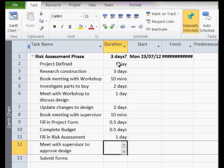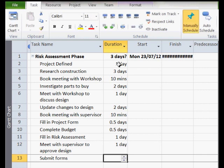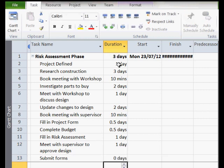Submitting the form is the milestone. It is what we are aiming to complete the risk assessment task phase. Milestones are created by setting the duration to zero days. You will notice it becomes a little diamond in the Gantt chart.